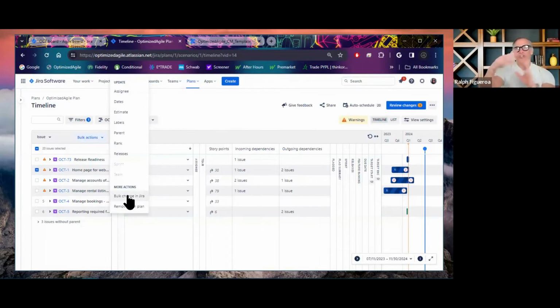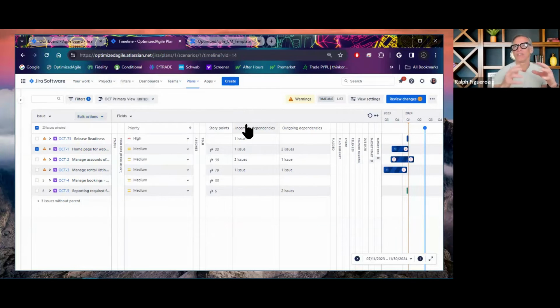And I was going to talk about the fixed versions for feature complete and code lock, which a lot of program managers, project managers, and release managers use. Those are really fixed versions that you can add, and they will show up as dots here. If you want to break your project down into not only just the final end date, but some internal milestones, like the FC, feature complete milestone, use the fixed versions and it will just show up as a blue dot. And then you can map all your epics to hit that fixed version as well. But that's a deeper conversation, so I'm going to park that to take any random questions that people have.